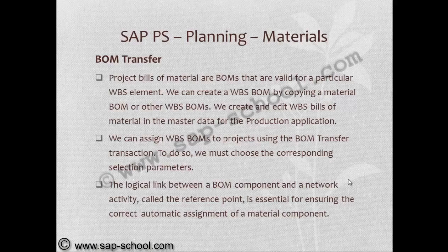To do so, we must choose the corresponding selection parameters. The logical link between a BOM component and a network activity is called the reference point, which is essential for ensuring the correct automatic assignment of a material component.